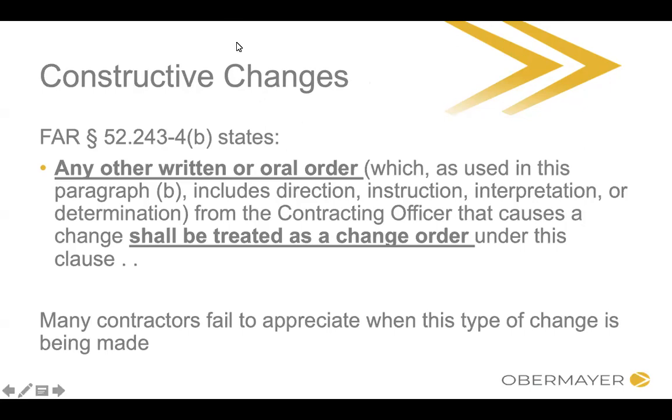Okay, fine. The contracting officer isn't calling this a change. The contracting officer is saying that this is part of the scope, or maybe they're expressly telling you that they don't think it's a change. If you think it's a change, and that can include things like direction, instruction, interpretation, or determination, and we're going to look at examples of that in just a second, that is a change, or at least arguably is a change, and you need to be looking into or perhaps discussing with a specific legal professional whether or not it falls within this clause.